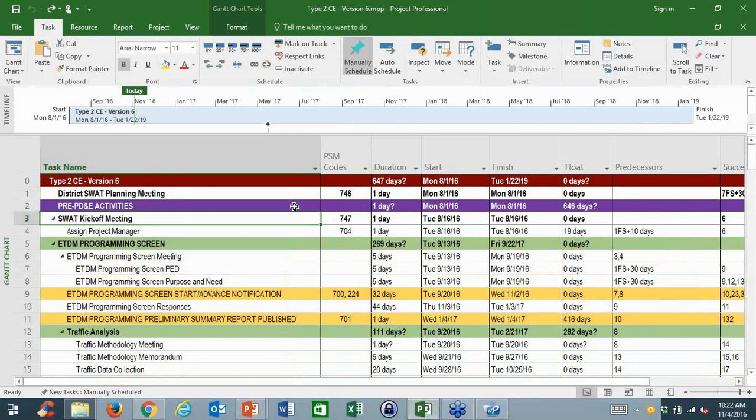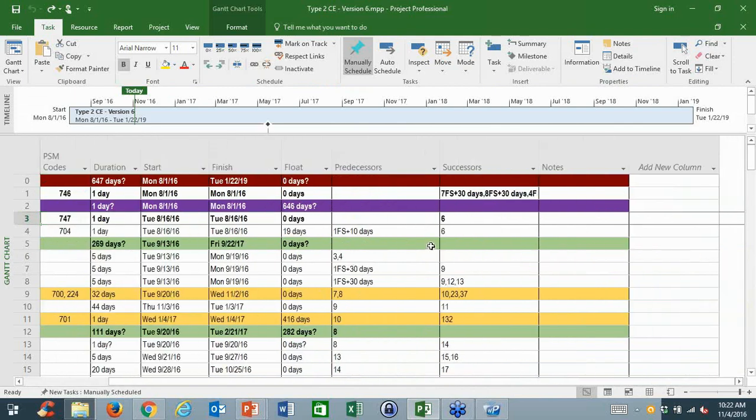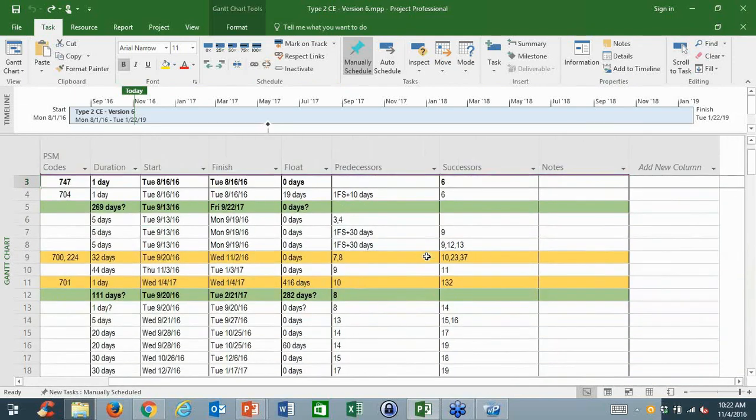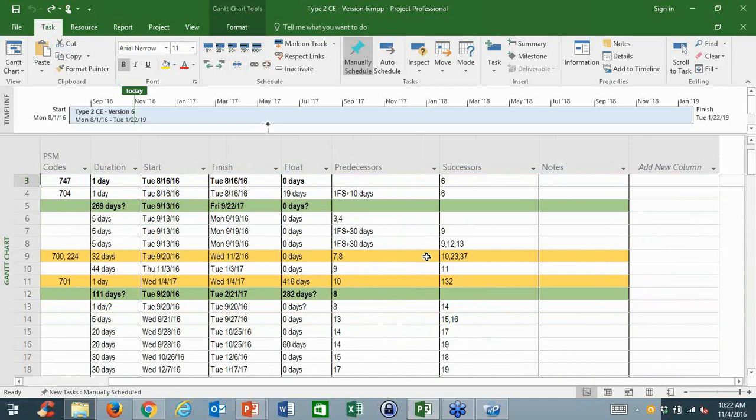Okay, second question just came in, Imran. Will successors and predecessors be supplied for each scheduled activity in the new templates? Absolutely correct. Schedule doesn't make any sense unless you can see what the predecessors and successors are. The whole thing about designing these new templates is, and I'm going to show this in a demo, that we wanted to relate all these activities.